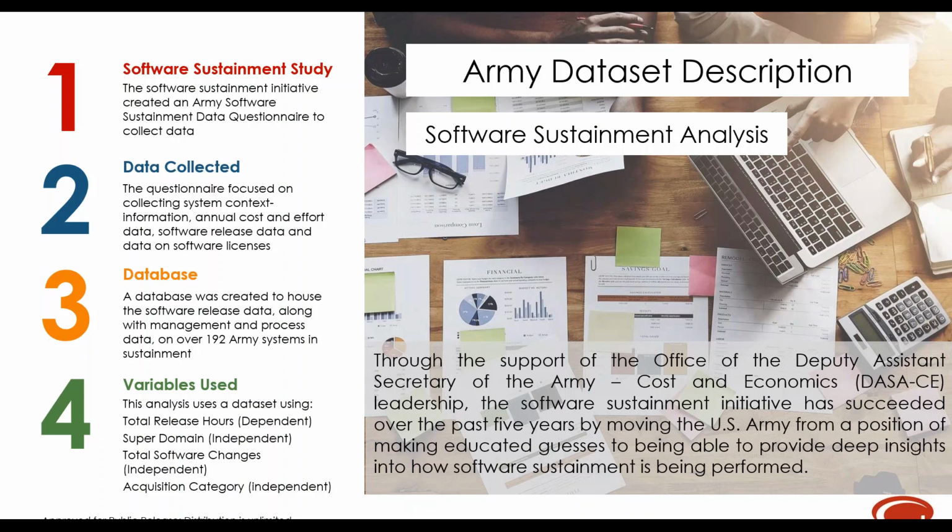And for this analysis, we used one of the trim data sets. And they did trimming based on unit costs, so the total release hours over a number of software changes. And they trimmed the upper 10% and the lower 10% of the data. And the variables included in our analysis are total release hours as a dependent variable, and superdomain, total software changes, and acquisition category as independent variables.